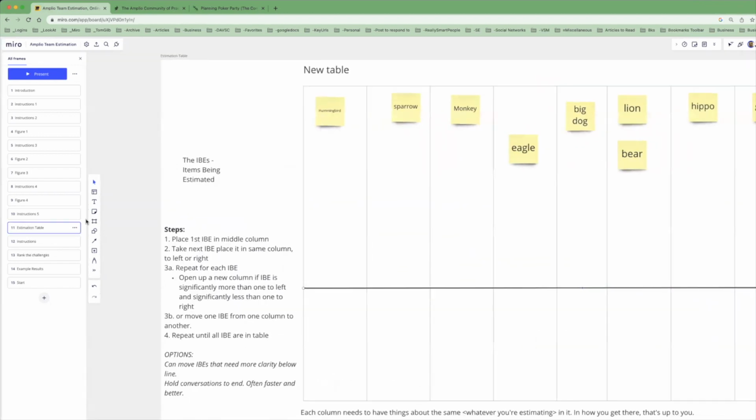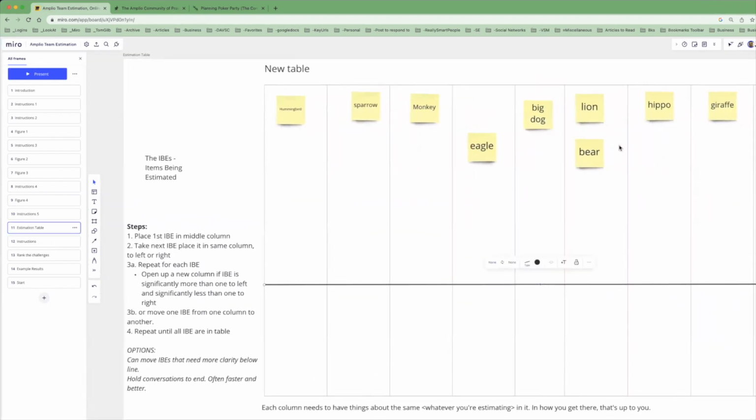Okay, so now what we do is we want to estimate these, but we have to talk about, we were estimating these, I said, by weight. Now, if we were doing estimates of what's on a product backlog or iteration backlog, we might use story points. And I like story points actually. And I have found that they're useful. This, first of all, cuts the cost, the time of the estimation down by 75%, at least by a fourth. Some people have told me it goes faster.